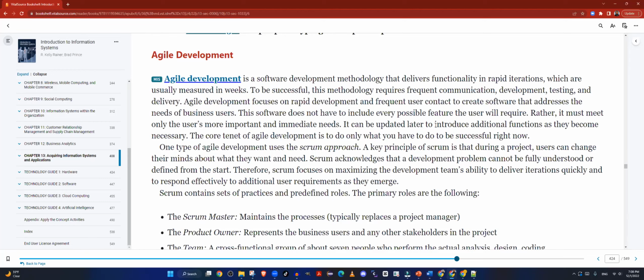You basically break down the problem statement into smaller problems. That okay, this problem statement says that the company needs these 20 items. So there are 20 small problems within this one big problem. Then you prioritize those 20 items. And now you can get to the company and say, okay, these are your 20 problems. Which 5 problems do you want to be solved first? So you prioritize your list. Each prioritized item is called a story.